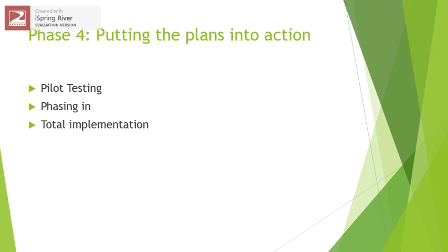First, let's focus on pilot testing. Pilot testing is very important because it allows planners to identify and work out any mistakes of the program before it is offered to a priority population. Pilot testing of a program should be performed on similar individuals and settings compared to the actual priority population and setting to get true results. If the pilot test does not use a similar population or setting, then problems within the program specific to the actual priority population will not be identified.